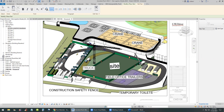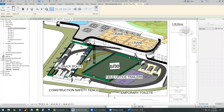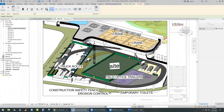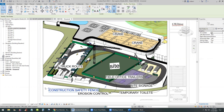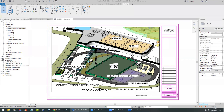Anything not modeled — such as erosion measures or truck routes, which are already represented by the street and road — you can just take care of with a note. I'll add a note for erosion control measures; this would be just a silt fence. You can also add staging areas for materials and equipment the same way. Signage is important for wayfinding — when trucks come to the site, put a sign indicating the truck route for deliveries so drivers know where to go.